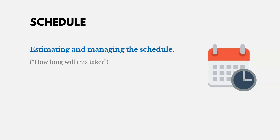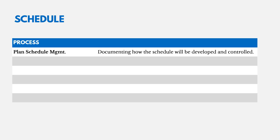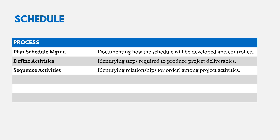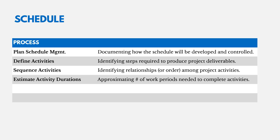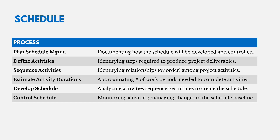Schedule management involves estimating and managing how long things will take. There are six processes — five in planning and one in monitoring and controlling. We plan schedule management, then define activities by breaking the WBS down into individual steps required to produce deliverables. We sequence those activities in the right order, estimate their durations, and develop the schedule by analyzing sequences and estimates to create the schedule baseline. Finally, we control the schedule by monitoring activities and managing changes to the schedule baseline.